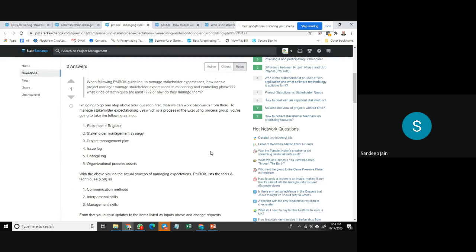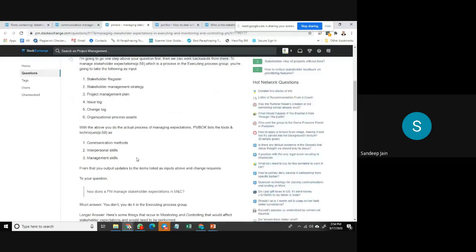So these are a few ways of monitoring, and then the other ways, which are not mentioned in the PMBOK because these are the points taken from the PMBOK, point number 1 to 6, are whether meetings are happening with the stakeholders or not. Somebody can take a look at the minutes of the meeting, which will be there somewhere in the repository, and check whether a meeting has been scheduled with all the stakeholders and whether they're happening regularly.